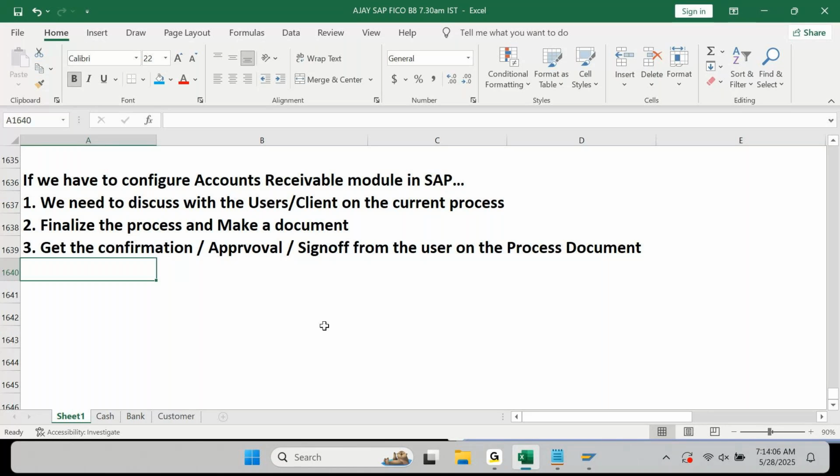Later on, if there is no email confirmation, and something is wrong, if the user is telling, no, this is not what I wanted, it should work in this way, will I have a proof or not? See, this is what we already discussed, this is what we already documented, this is what you already confirmed, in which this is nowhere mentioned. It will be the proof that you are not making something different. Am I right?